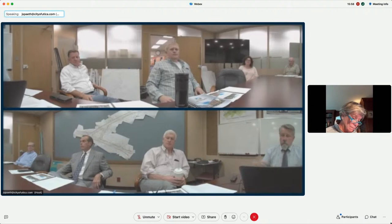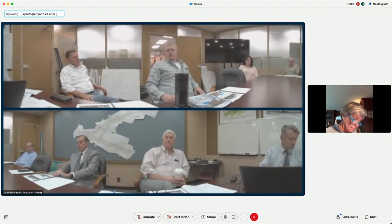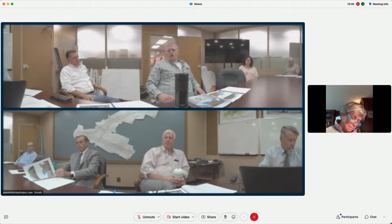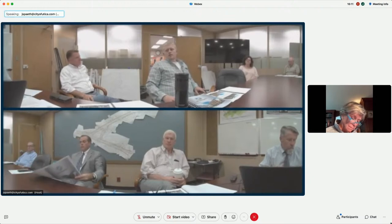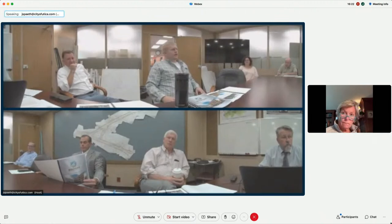So let's talk about that one. The 252 building, most of it will be done by the end of the year, but definitely by March fully complete. And then we're working right now with our construction manager. Couple of things have kind of blindsided us, like right now there's a national shortage of getting toilets. So obviously nothing we would have ever expected.